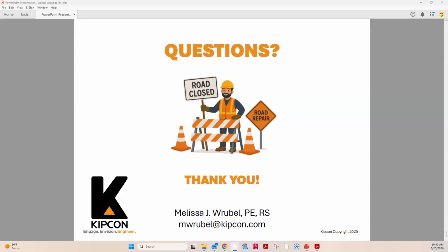Oftentimes contractors will have right in their bid how long that bid is good for. But usually it's good for the season. So you get a bid in the spring, you're ready to do the project by September, that price really doesn't change. It's when you put projects off for more than one season that you're going to start to see price changes.